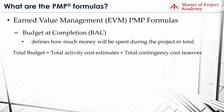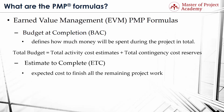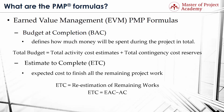PMP formula number 8: Estimate to Complete or ETC. Estimate to Complete represents the expected cost to finish all the remaining project work. ETC can be determined by re-estimation of the remaining works in a project, in which case its formula is: ETC equals re-estimation of remaining works. Also, we can calculate it by subtracting the actual cost (AC) of the accomplished activities from EAC. Assuming the work is proceeding as planned, the formula is: ETC equals EAC minus AC.